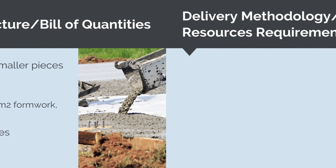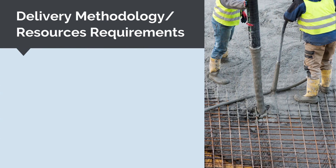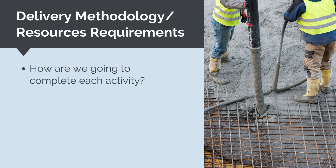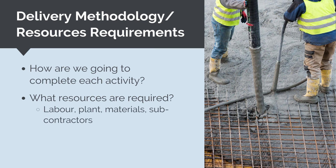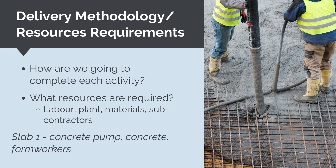For each activity in our WBS, we then need to understand what resources we need. We need to understand the delivery methodology — exactly how we are going to do the work and what is required to do it. The resources needed for each activity will be a combination of labor, plant, materials, and subcontractors. For example, for slab one, we would need concrete, a concrete pump, concreters, formworkers, and so on.